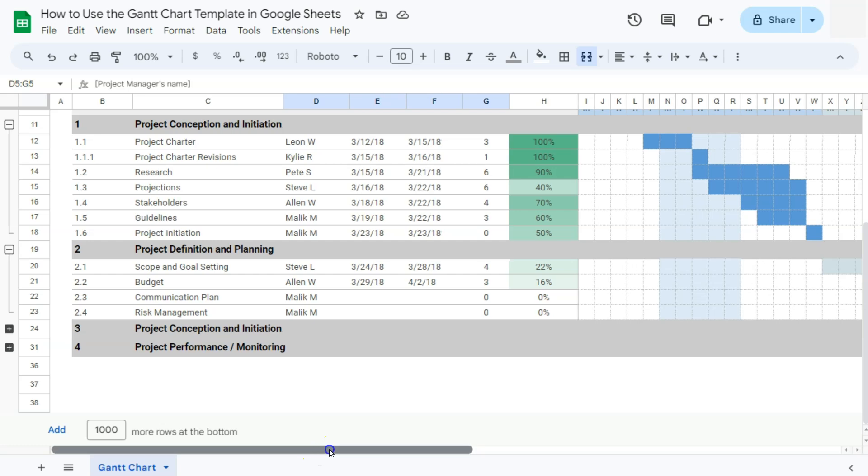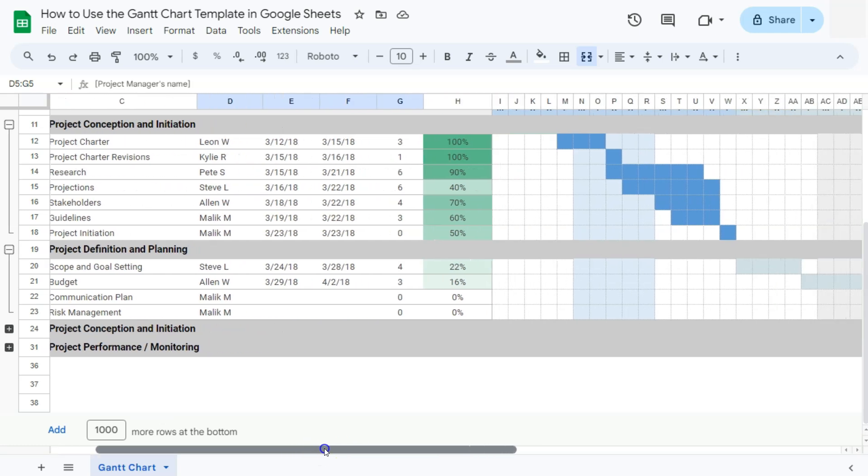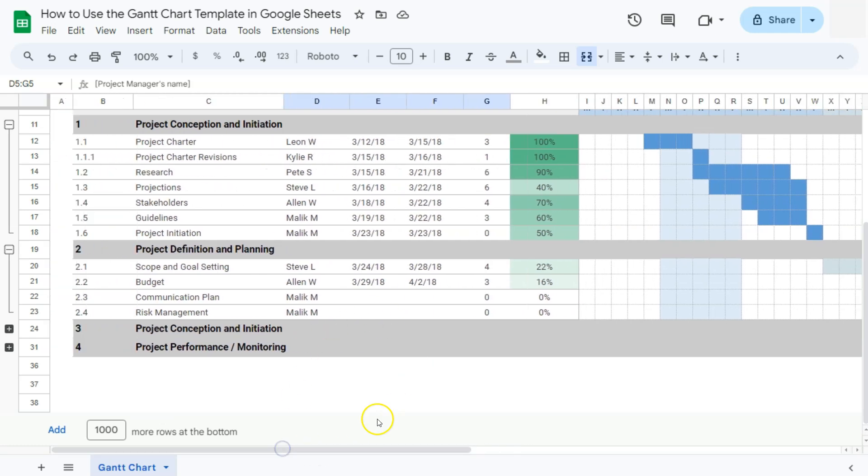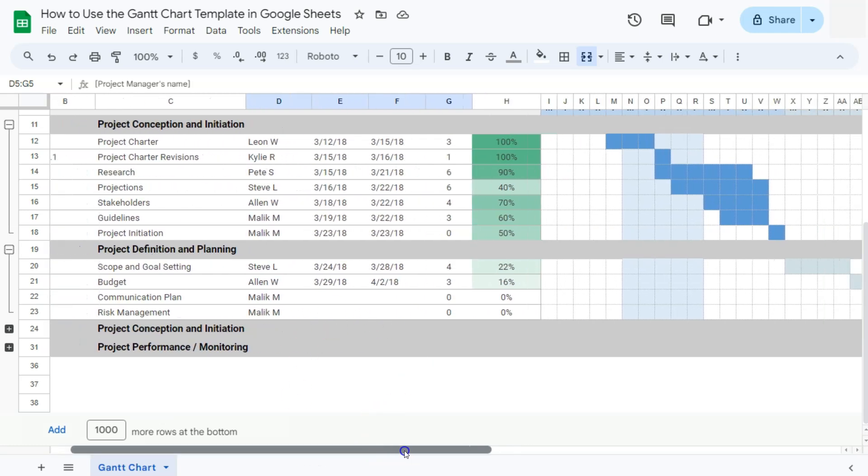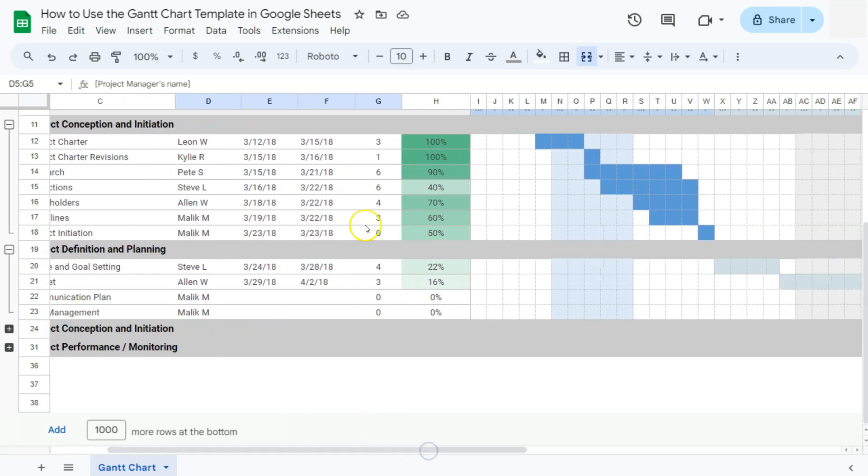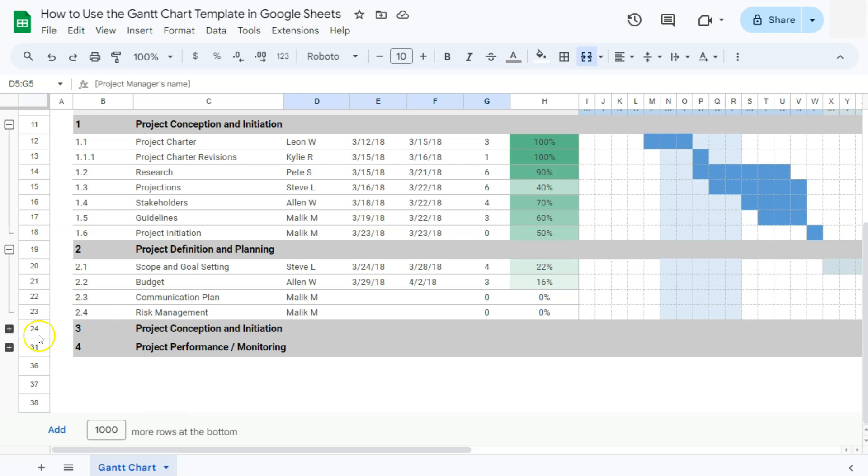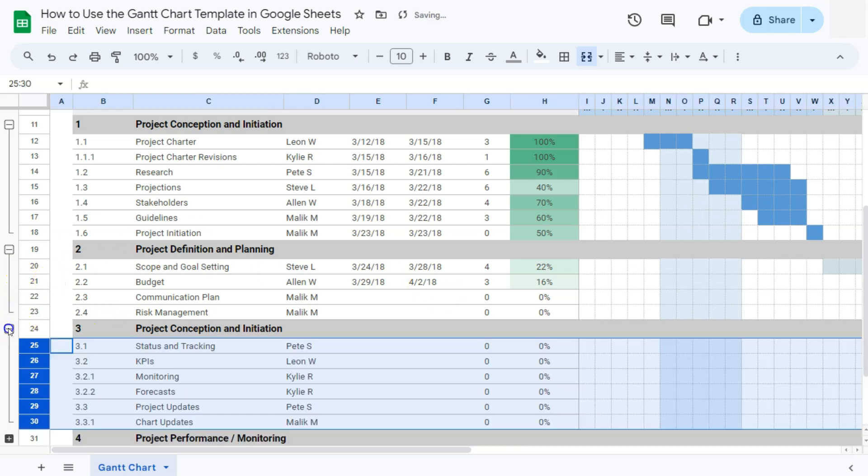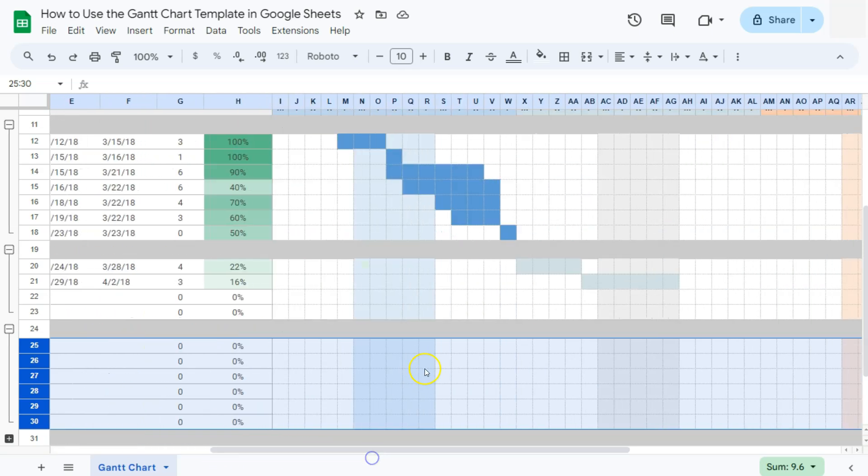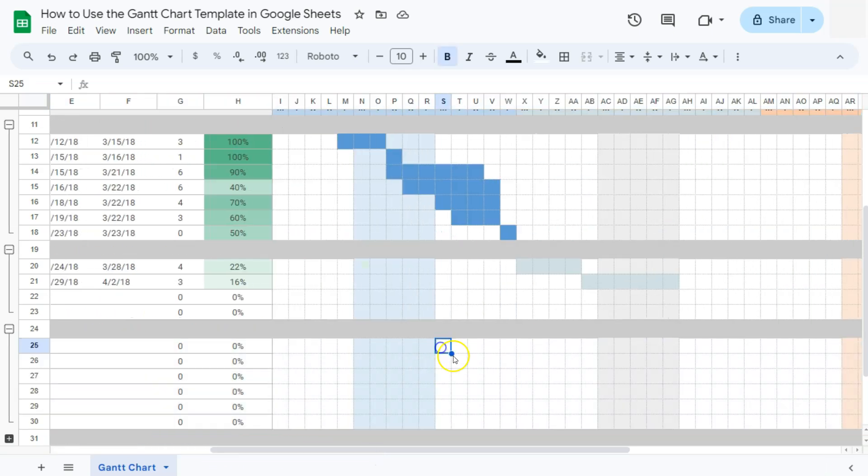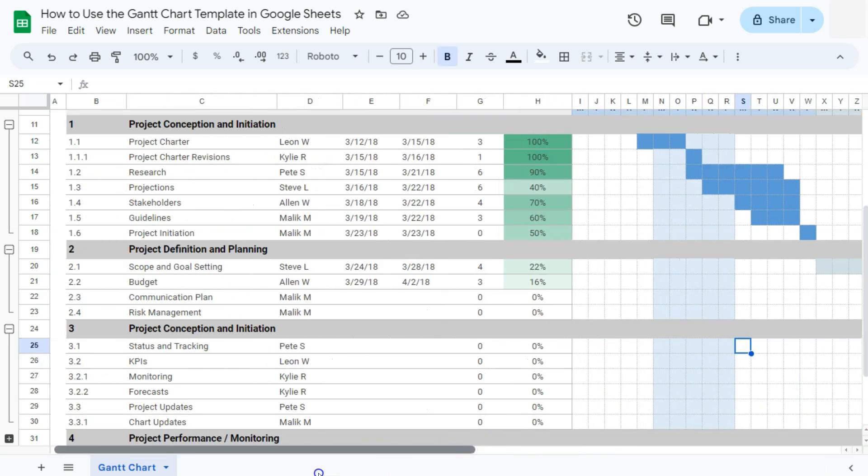Since some of these projects depend on each other, unless we have finished the first part of our project, we won't be able to move with the next phase. So once you're done with that, then you can simply expand these rows right here to continue monitoring the progress of your projects.